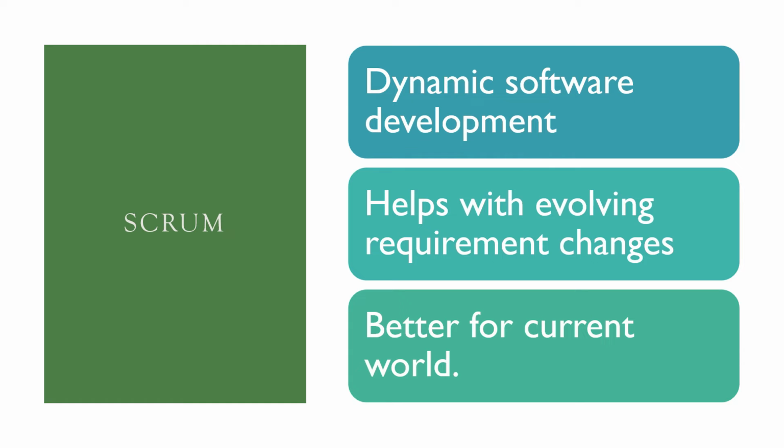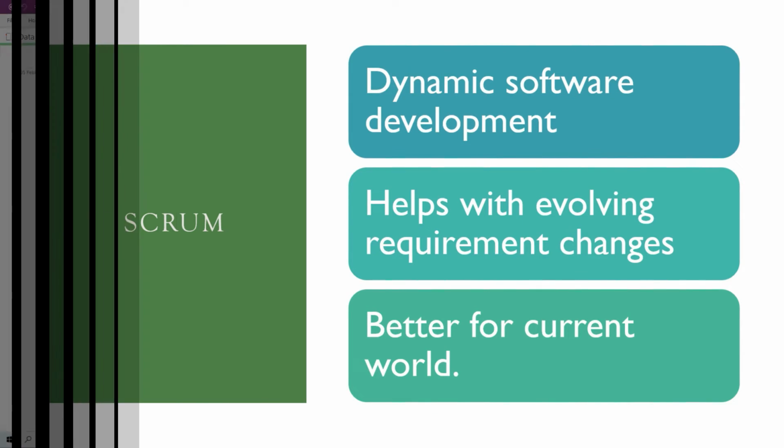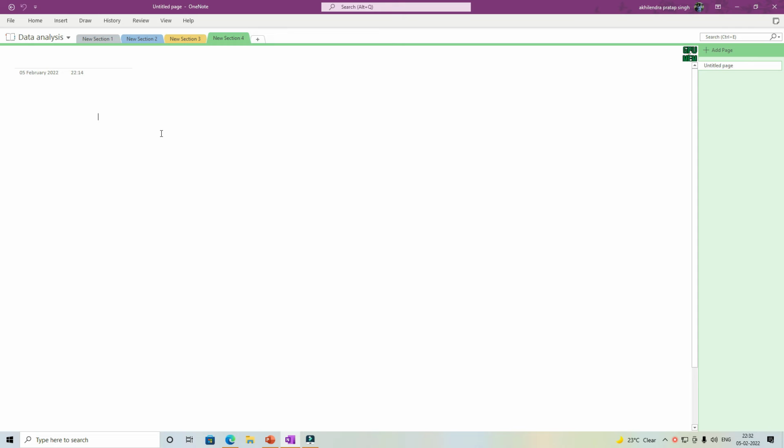It's happening in the sprint, and all the activities like requirement gathering, development, testing, everything is happening again and again in the sprint. So if you have 10 sprints, you will start with something small, more like MVP, build it, show it to the client, get the feedback. So to explain it better, let's look at these diagrams.